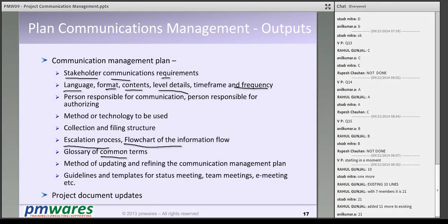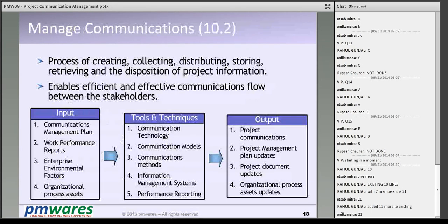Who needs what information, at what time, at what interval, in what mode, in what technology, in what form, this is all part of the communication management plan. Once you have this plan, the next step is to manage and distribute the communication. Manage communication means creating, collecting, distributing, storing, retrieving and disposing it.